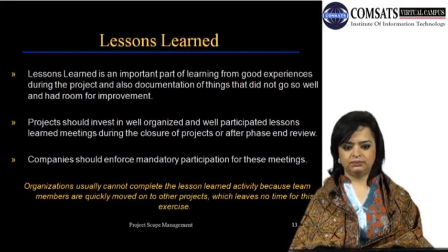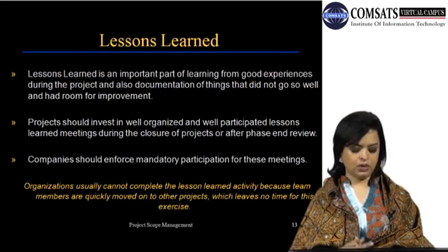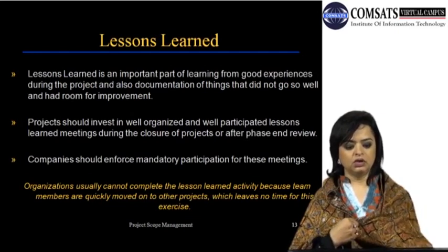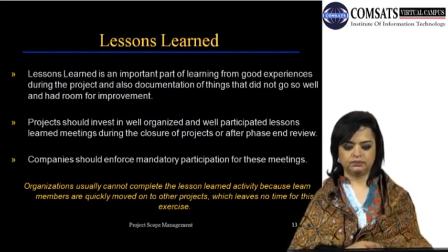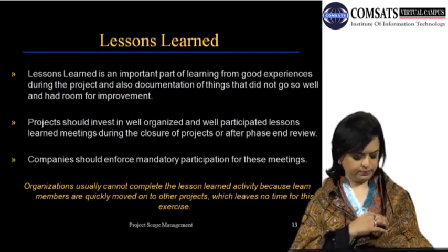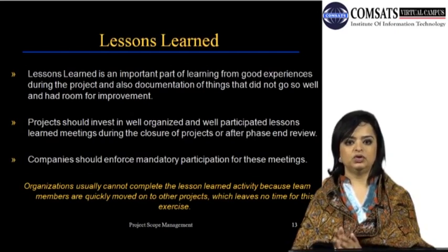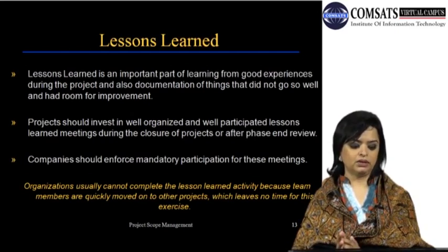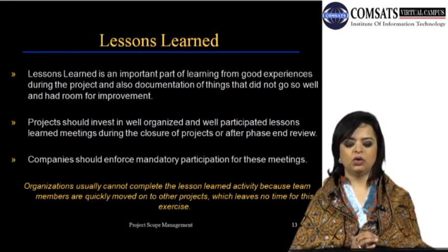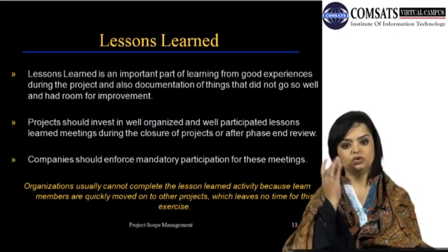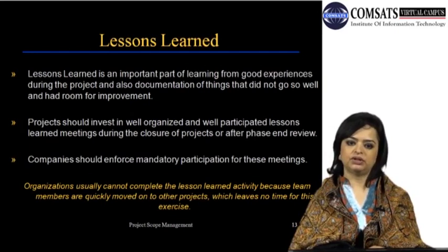And more often there are situations which should be avoided, and things that did not go very well. These are considered the SADs, things that did not go very well, to the GLADs, the things that went very well. All projects should invest in well-organized and well-participated lessons learned meetings during the closure of projects or after the phase end review. Lessons learned are usually done in the closure phase of the project.